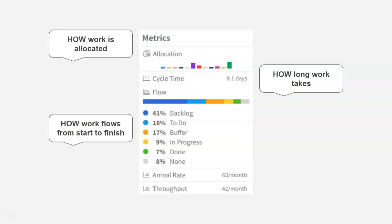And this is very powerful because you will be able to see where you might have flow issues. And when you click on this, you'll be able to also generate a full cumulative flow diagram to actually pinpoint what's going on with your flow.